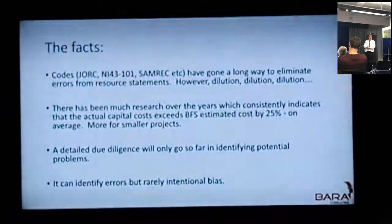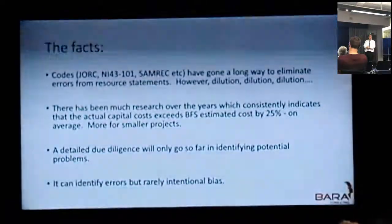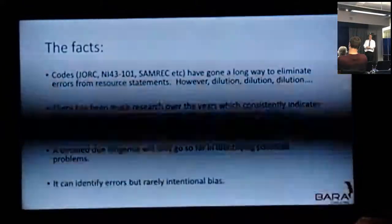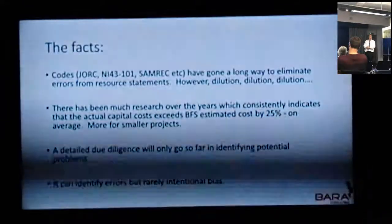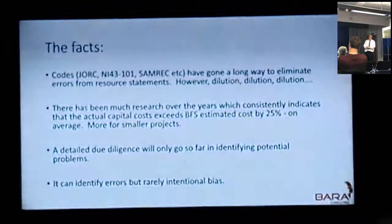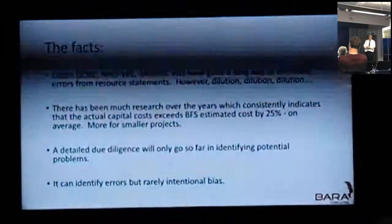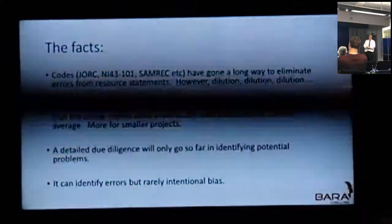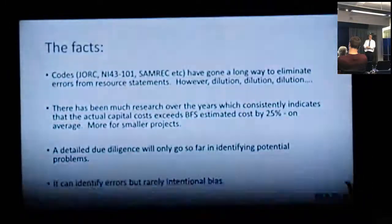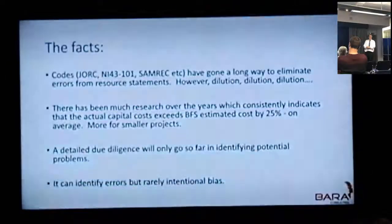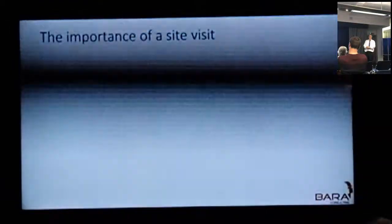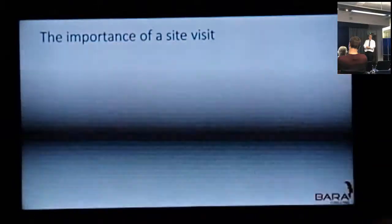Some facts. The codes have gone a long way to eliminate errors from resource statements. However, dilution is a big problem in reserve estimates, and I'll put a slide on that a little bit later. There's been much research which consistently indicates that actual capital cost exceeds BFS estimates by around 25% on average — at least larger than that for smaller projects. And detailed due diligence will only go so far in identifying potential problems. We're often asked, believe it or not, to do due diligence without going on a site visit.